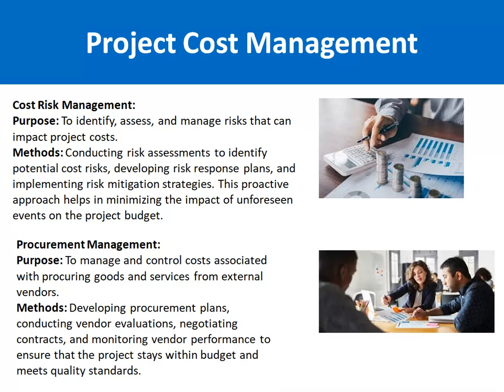Okay. Then procurement management, like we have to procure so many goods and services whenever we are implementing projects through any external vendors. So basically you have to develop a procurement plan, conduct vendor evaluations, negotiate contracts, and monitor vendor performance to ensure that the project stays within budget and meets quality standards.